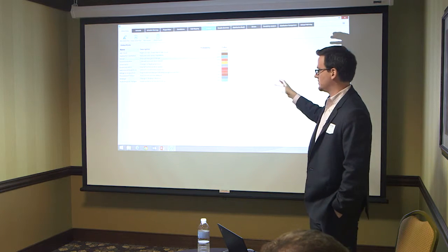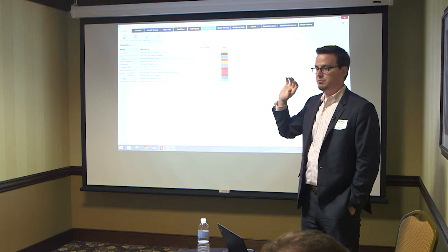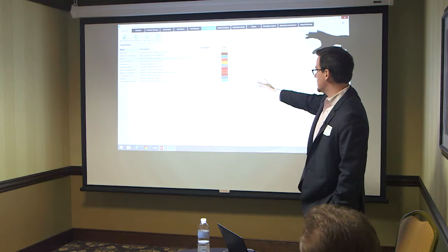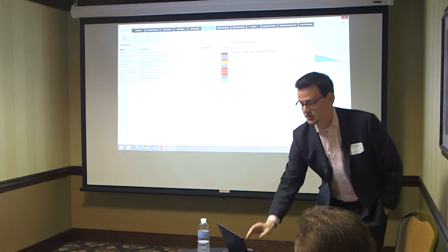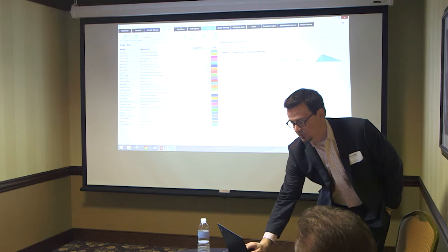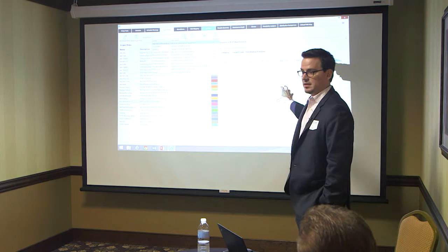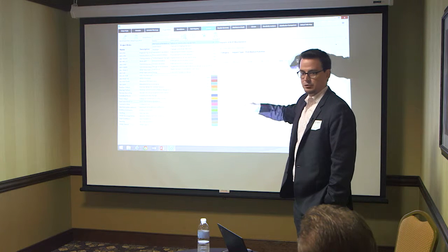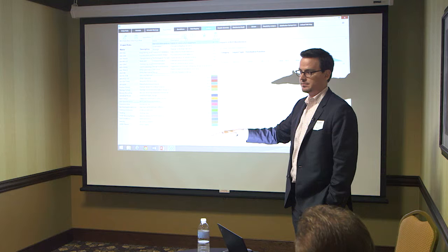We find many organizations are saying, there's things we're concerned about. We want the entire organization to at least be prompted to inspire some thought. Did they go through it? We can define them here with some kind of preliminary assessment of what we think the risk is to the organization, and then they're exposed over here for the project team to think about them, pull them in. They quantify them how they see it impacts the project, and then we maintain the link behind the scenes, which allows us to report on it later and say this global risk looks like this across your different projects.